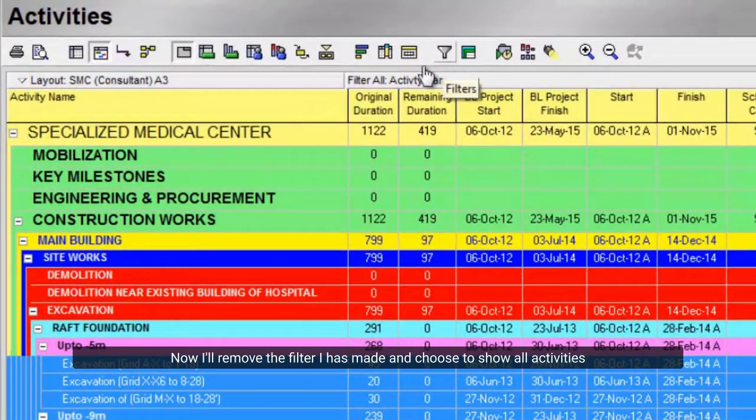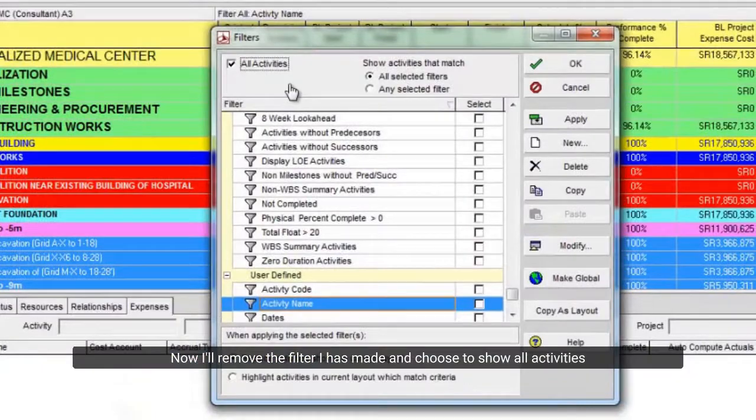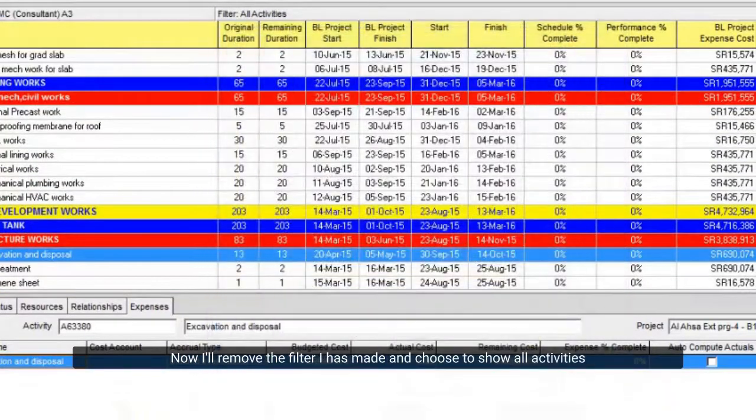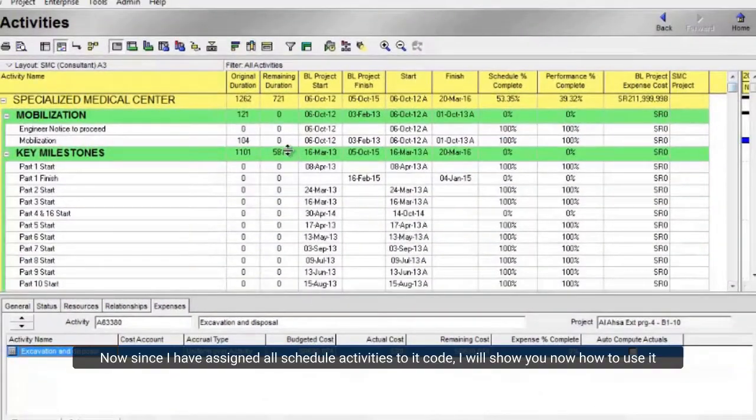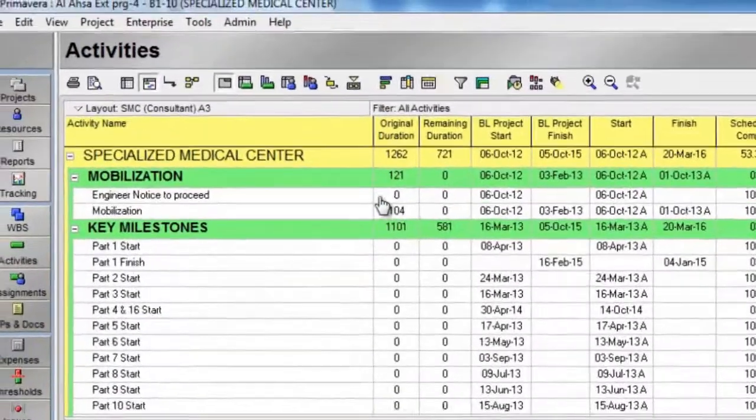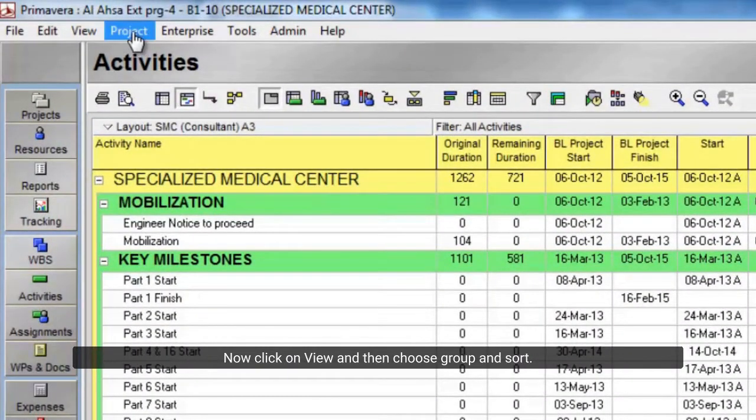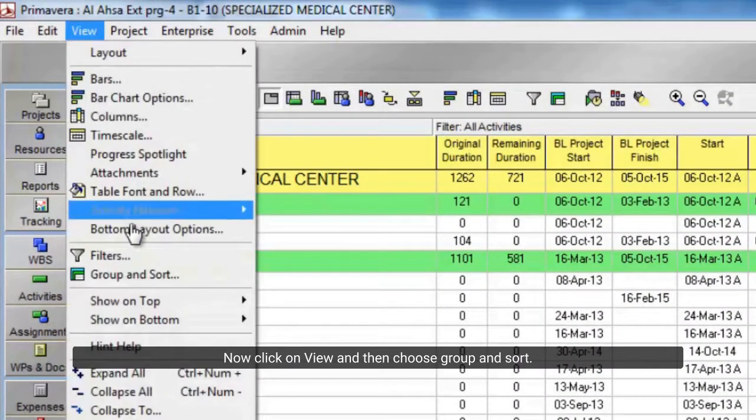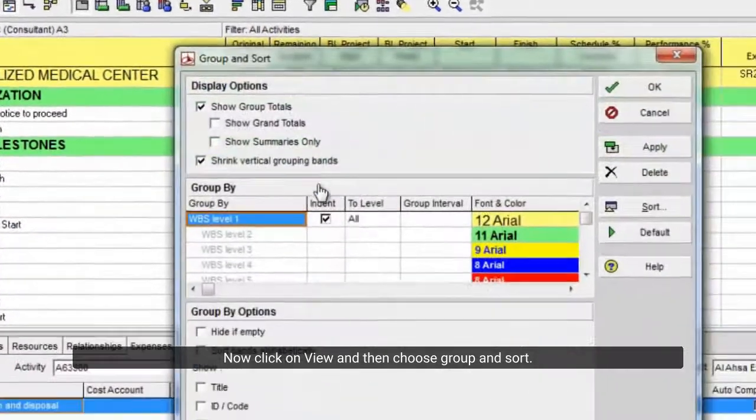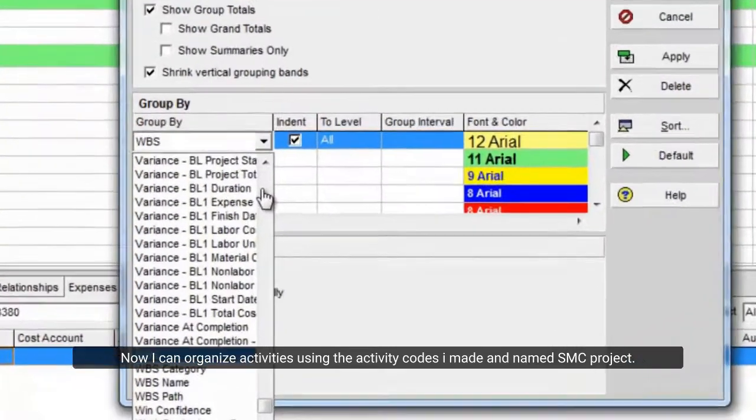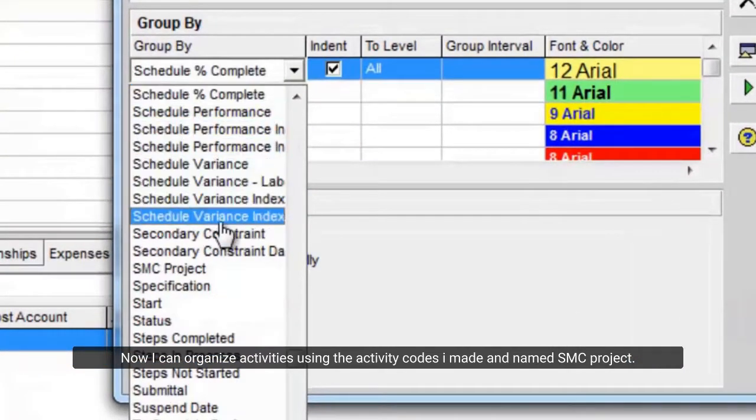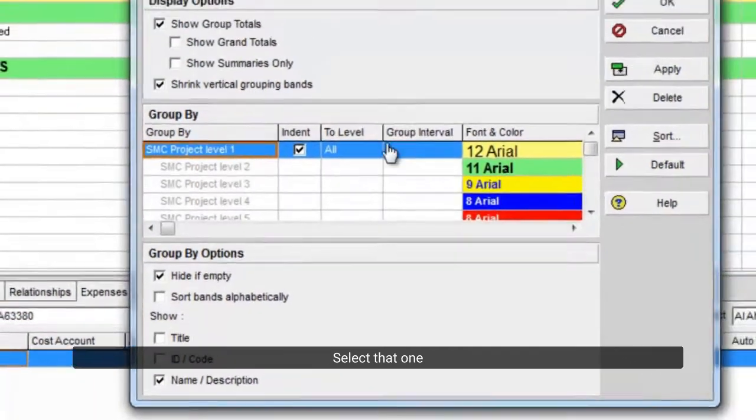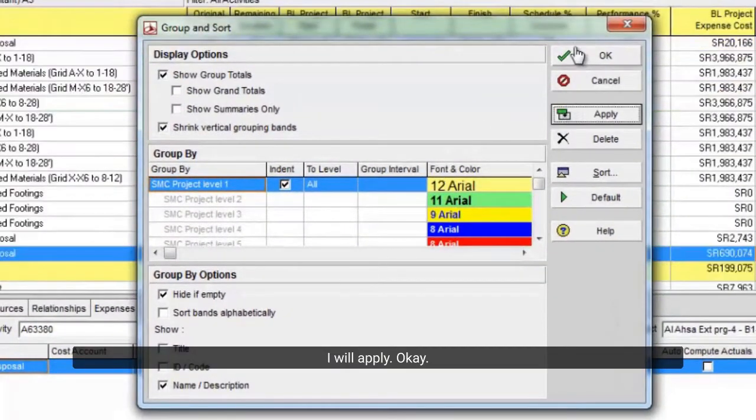Now I'll remove the filter I has made and choose to show all activities. Now since I have assigned all schedule activities to a code, I will show you how to use it. Now click on view, and then choose group and sort. Now I can organize activities using the activity codes I made and named SMC project. Select that one. I will apply. Ok.